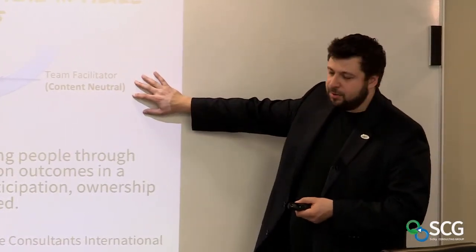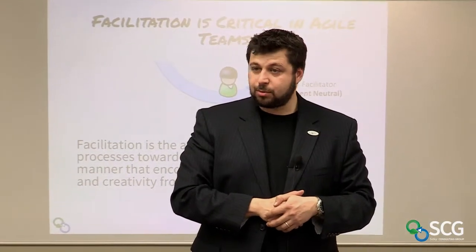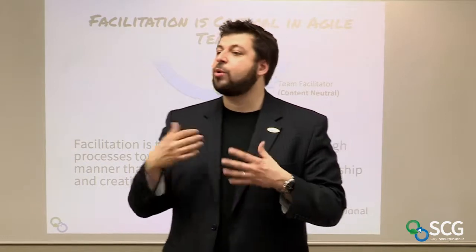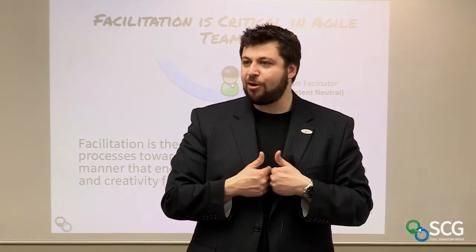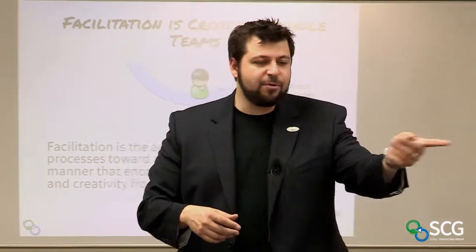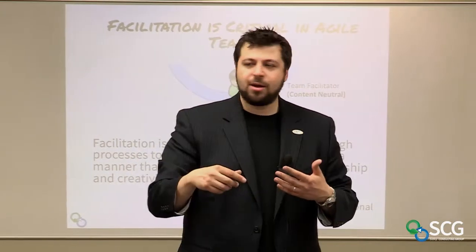When we talk about a team facilitator, facilitation is the art of leading people through a process to do what? To get an outcome. So if all 6 of us here, I'm the facilitator, then standing here, I own process, not content. I would say, okay, I'd like everyone to write down where they'd like to go for lunch. So let's say we're going to come up to an agreed upon outcome, which is where we're going to go for lunch. Now, think about this. If I'm the facilitator, if I start providing content, what's going to happen? I'm going to muddy the waters, because I own both content and process. I'm going to say, all right, everyone, write down 2 options you want to go out for lunch. And if I start to gather all this and say, yeah, we don't like this, no, this is, wait, are we coming up with an outcome or are you making a decision for us?